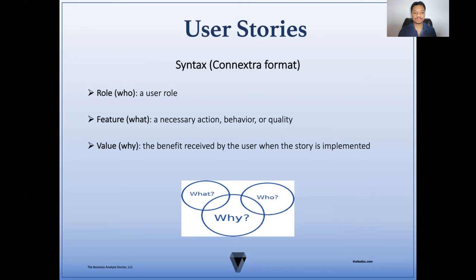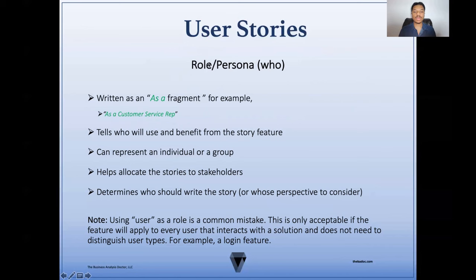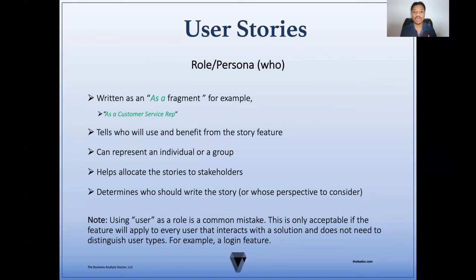Now let's look at each of these components in greater detail. Our role, or persona, is typically written as an 'as a' fragment. For example, 'as a customer service rep.' It tells us who will use and benefit from the story feature. It can represent an individual or a group, and it helps to allocate the stories to stakeholders. One thing to note is that using 'user' as a role is a common mistake. This is only acceptable for a feature that will apply to all users and does not need a distinguished user type — such as a login. You always want to have a specific role, persona, or actor so that we know who the story is for.